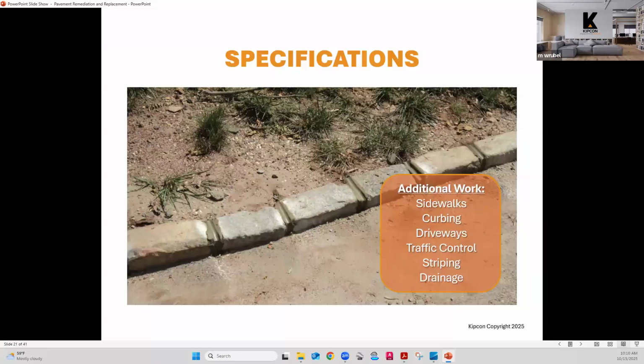So what I mean by that is, say, for example, your community needs roofing replaced, they need driveways replaced, and they need roadways replaced, just as an extreme condition. You want to do those projects in the order that when you're done with one project, you're not driving over or using in any way that finished component to do your next component. So in my example, you want to do roofs first. You know you got to do roofs. Do those first because you got heavy trucks coming out.